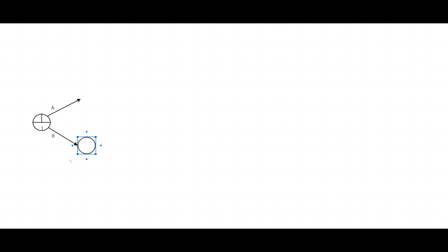You can keep the top space to write down the earliest starting time. Latest completion time, I'll explain how to calculate. And at the bottom of the circle, you can just write down the event number 2. According to the sequence, we put the numbers in ascending order. Then after completing B, we can start activity E. Just draw the arrow and name it.